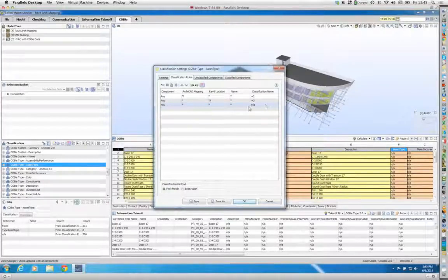Now this is something that we need to start working on, and again, this is beta software. This is another thought process on how we deal with it. So at certain stages of the CIC stages and the certain deliverables, the data drops, you have the choice basically whether or not you include data that you've filled in or not. So you could actually reveal data that is not required for that stage at this point in time. So you're actually providing data ahead of schedule.